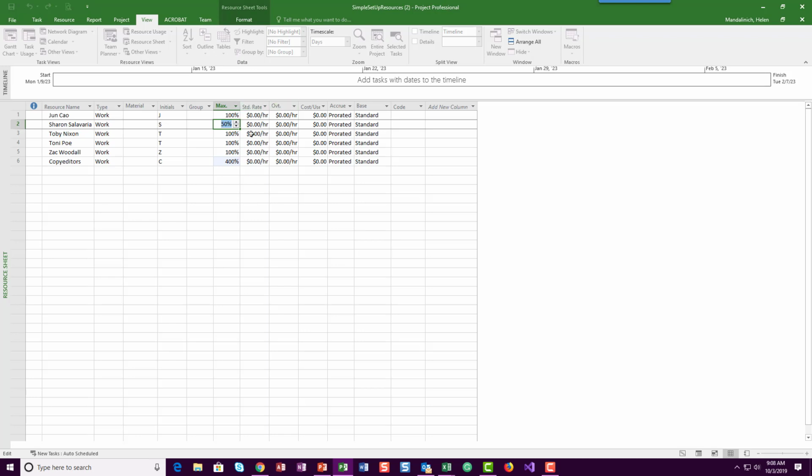So the next thing we want to do is put in their rate of work. I'm going to start at this first one, and that's an hourly person, so 42 per hour, so /hour. Sharon is a salary person, so her unit is going to be week, so she can do 1,100 per week.